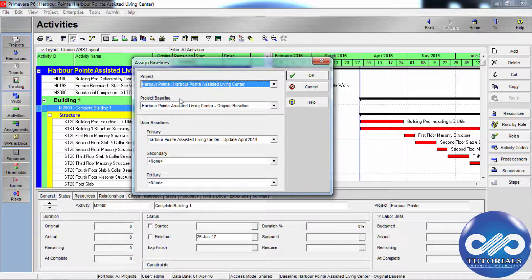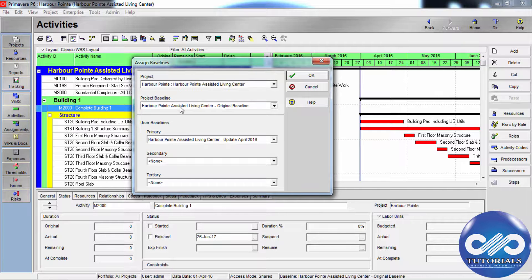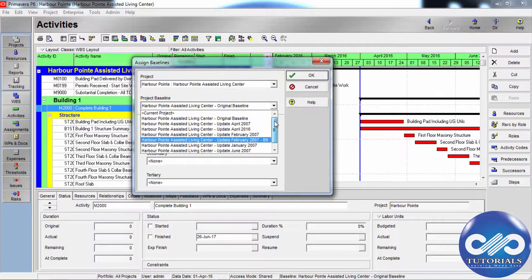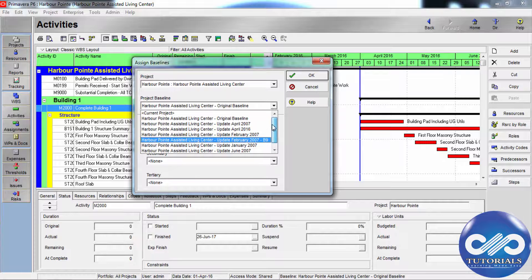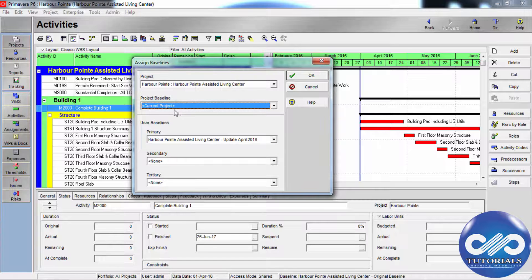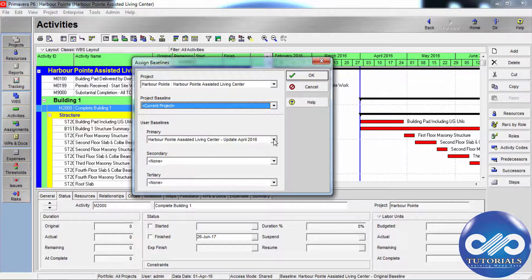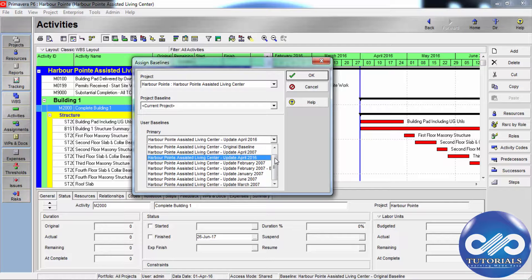In the project baseline field, select the desired baseline of the current project. If no baseline is designated as active, the current project is used as the baseline project. Each baseline field in the assign baselines dialog list has all existing baselines for the selected project.